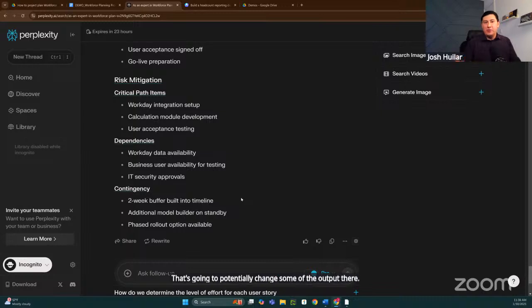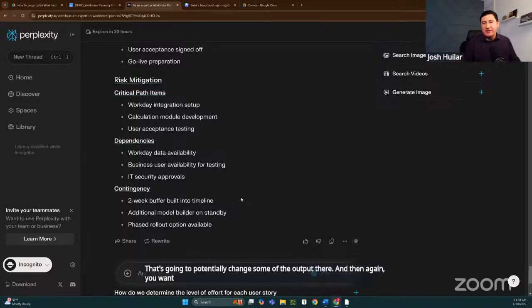And then again, you want to validate that the assumptions make sense based on other projects. Does 12 weeks really feel right? Does the team feel light in terms of having just one solution architect? Do we maybe need to have 3, depending on the scale of what we're trying to do? So I'm just going to pause there.